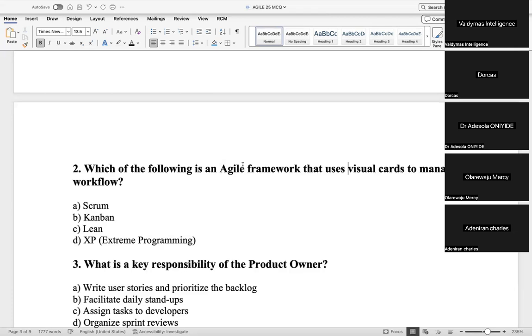So I said number 1, visualization. Number 2, work in progress. Number 3, the pull approach, because you can go and pull 3 stories, finish the 3 stories, and then go back to the backlog to pick another 3. Number 4, what we believe with this Kanban is that it improves their workflow, because now they know the flow with which they will do things. They know that our capacity can carry these 3 stories, and they execute them and finish them, and then they come back. So we're sure the 3 are finished by the time they come back for another 3.